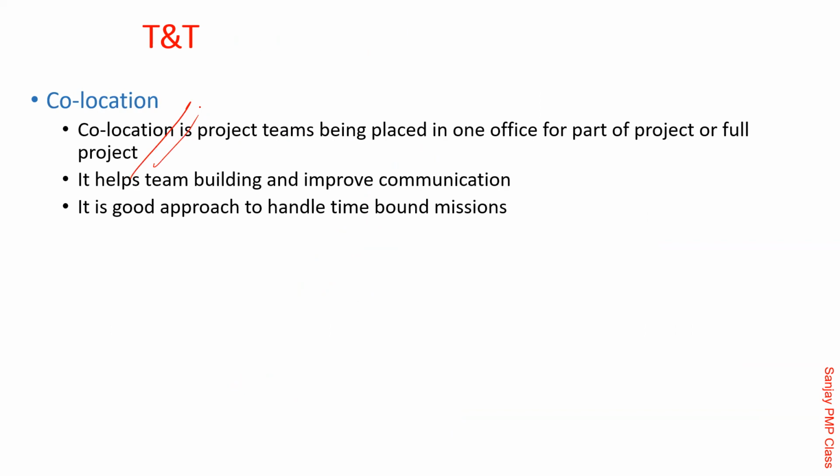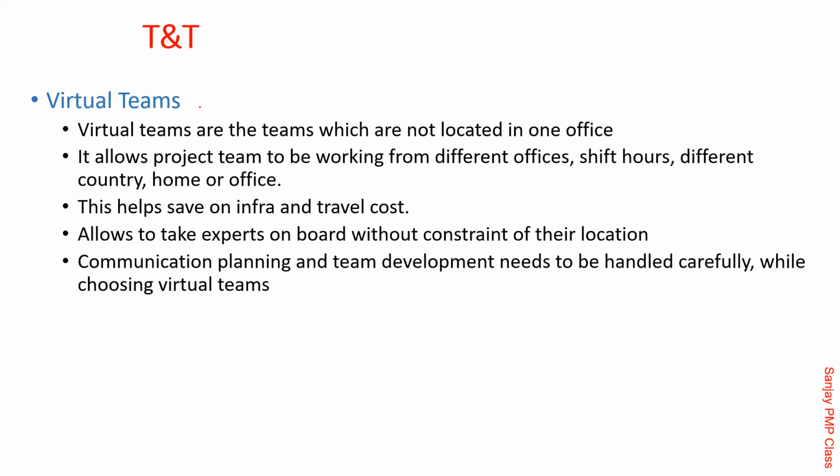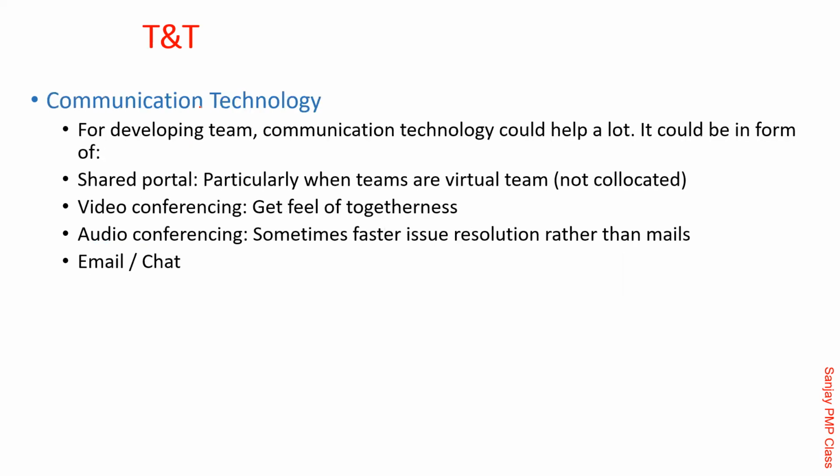Co-location, sometimes against virtual teams. In virtual teams, people are sitting apart, in different cities, as compared to one place. Co-location is the opposite of that, where people are sitting together. When you want to solve some problem, rather than doing everything over video calls and phone calls, you go ahead and make them sit together. Maybe for 3 days people sit together and solve some issue. It becomes very effective. It's very useful when you are doing mission critical things. Virtual teams are the opposite of co-location.